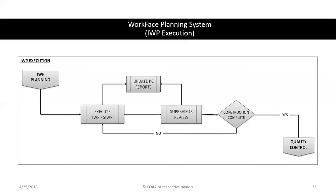With IWPs done, we move into IWP execution. The focus is on the safest and most productive installation of material or completion of tasks. This stage is initiated with the release of the first constraint-free IWPs, with focus on safe execution and sticking to the optimal path of construction or the IWP release plan sequence. This phase also manages IWP punches and the completion of system installation work packages if the project turnover is system-based, including clearing system punches.